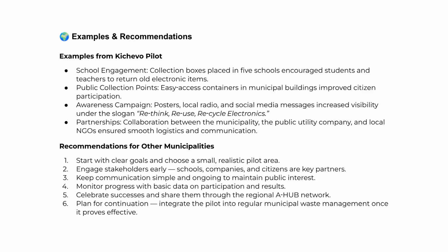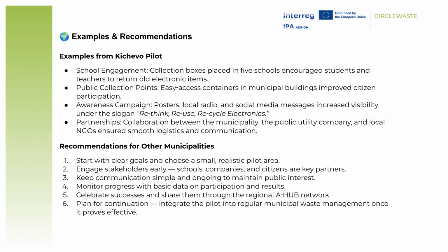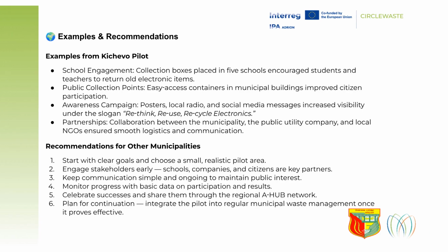Common challenges include low citizen participation, which can be solved by increasing visibility through schools and social media. Logistics delays are addressed by direct contact with partners. Limited resources require focusing on high-impact actions. Data inconsistencies are solved with a simple, shared recording sheet.